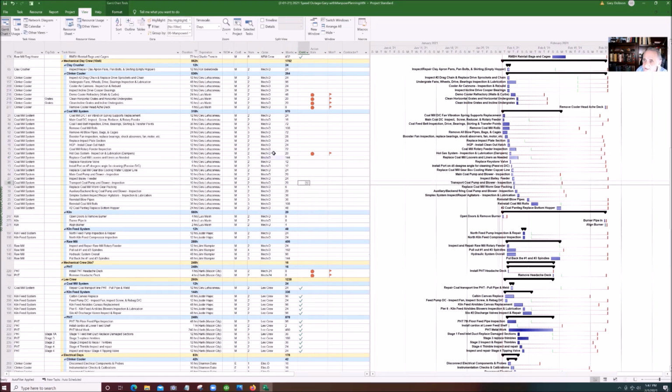So it's very easy to fix this problem. On the other hand, for a few of these jobs, we could supplement our own mechanics by adding some contract mechanics to help us, in which case we would push down the numbers of our own mechanics. So there are many ways we can do this.